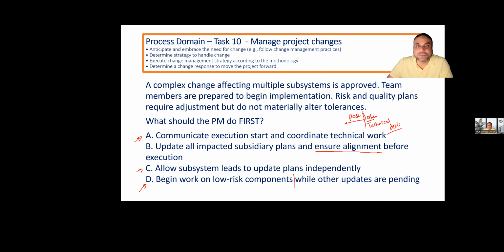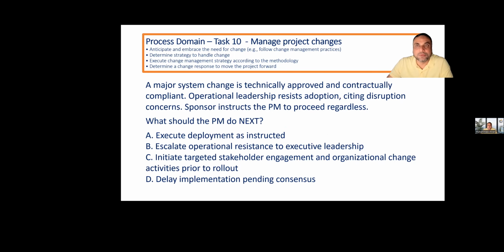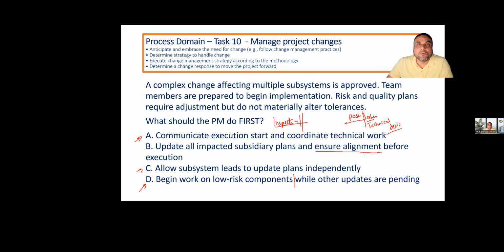While as per the principles of project management, we do not carry technical debt. Instead, we perform inspection and we perform alignment all the time. Whatever we do, we inspect to ensure we are going in the right direction instead of just doing the work. And to ensure we are working in the right direction, in predictive we have the phase gate, and in adaptive we have the review meeting to review those things. Very good. Okay. One logical question on what I just explained, that we have review meetings in adaptive and phase gates in predictive.